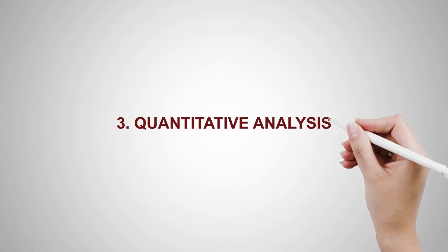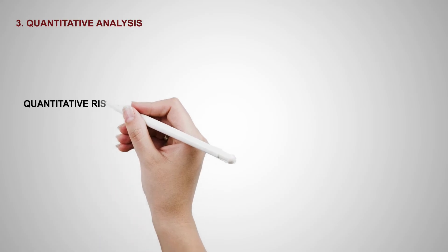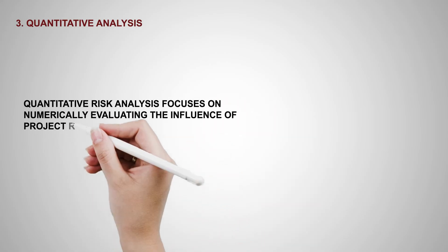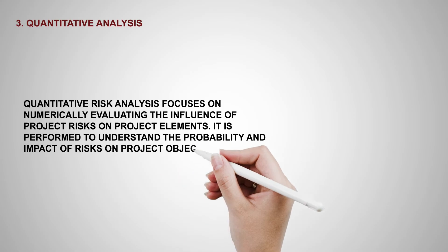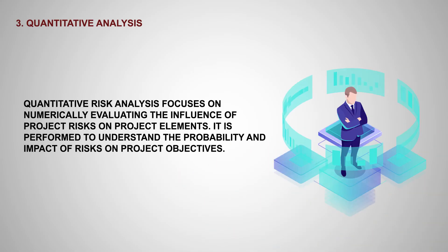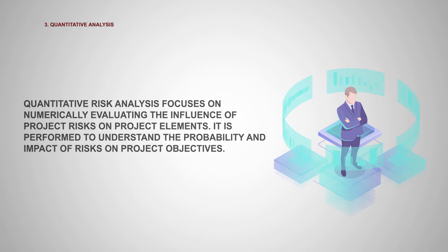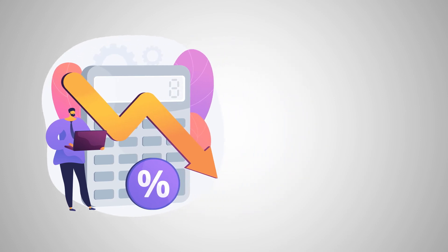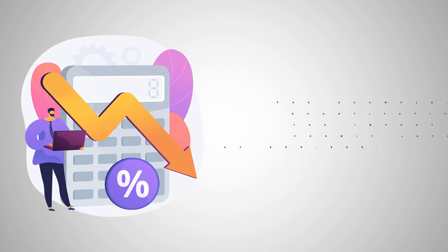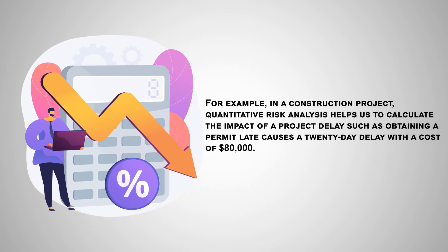Step 3: Quantitative Analysis. Quantitative Risk Analysis focuses on numerically evaluating the influence of project risks on project elements. It is performed to understand the probability and impact of risks on project objectives. For example, in a construction project, quantitative risk analysis helps us to calculate the impact of a project delay, such as obtaining a permit late causing a 20-day delay with an associated cost.